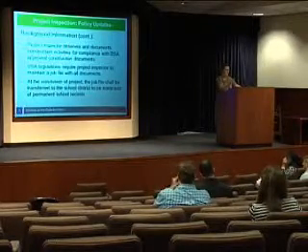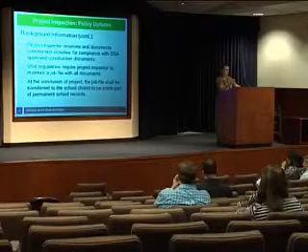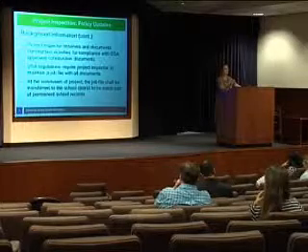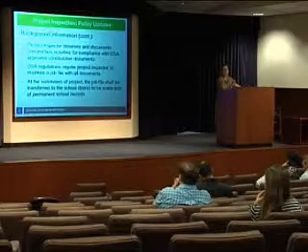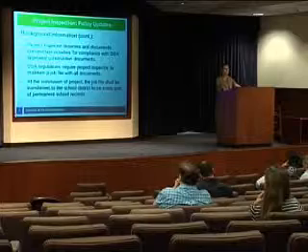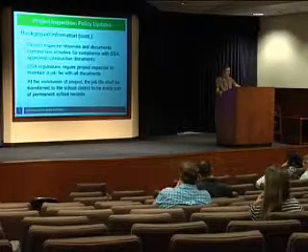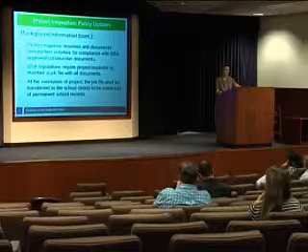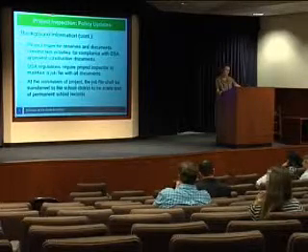DSA regulations require a project inspector to maintain a job file with all the documents. That includes everything from plans and specifications to meeting minutes from construction meetings that the inspector will attend along with the contractor and the architect. And at the conclusion of the project, the job file shall be transferred to the school district to be made part of permanent school records.